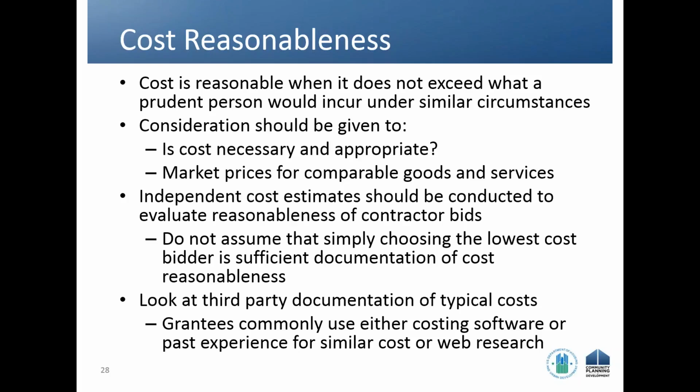That gives you the range of what you expect bids to come back at from your RFP. Do your RFP, and then compare the bids that come back to your in-house cost estimate, your independent cost estimate that you did prior to the procurement. If they don't line up, if you're not within some reasonable portion or percentage of what you thought it was going to cost and what your low-cost bidder thinks it's going to cost, then you need to go back and look at what's happened.